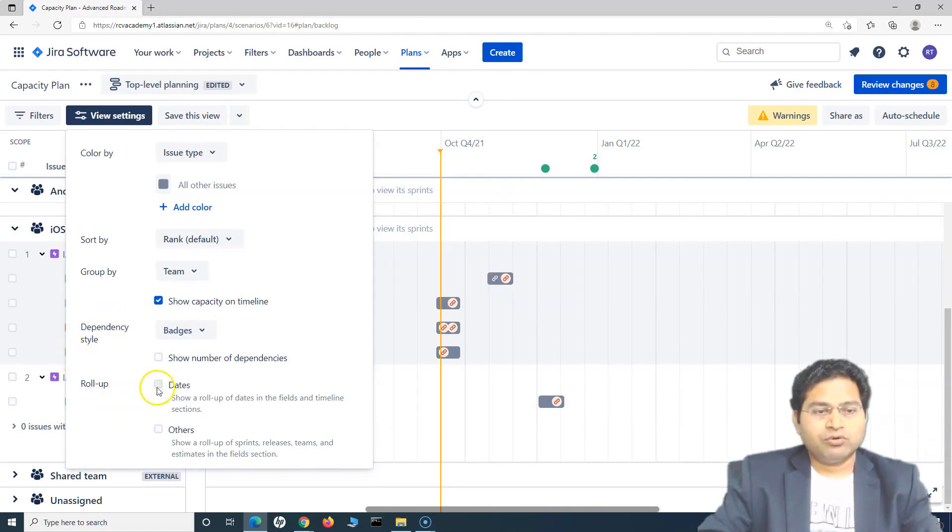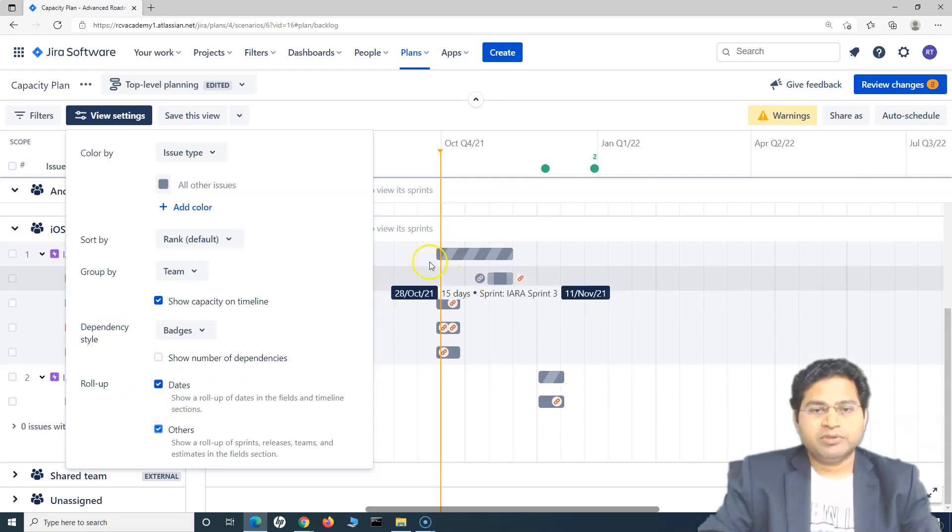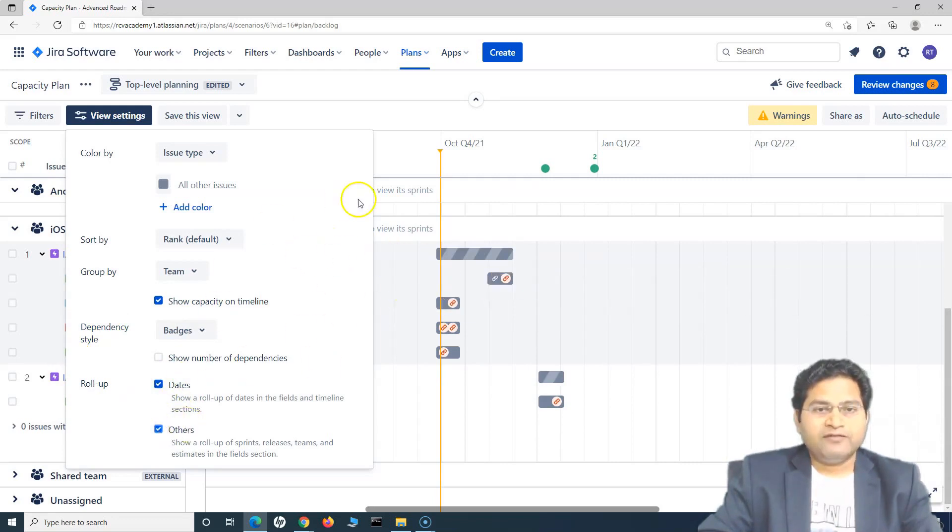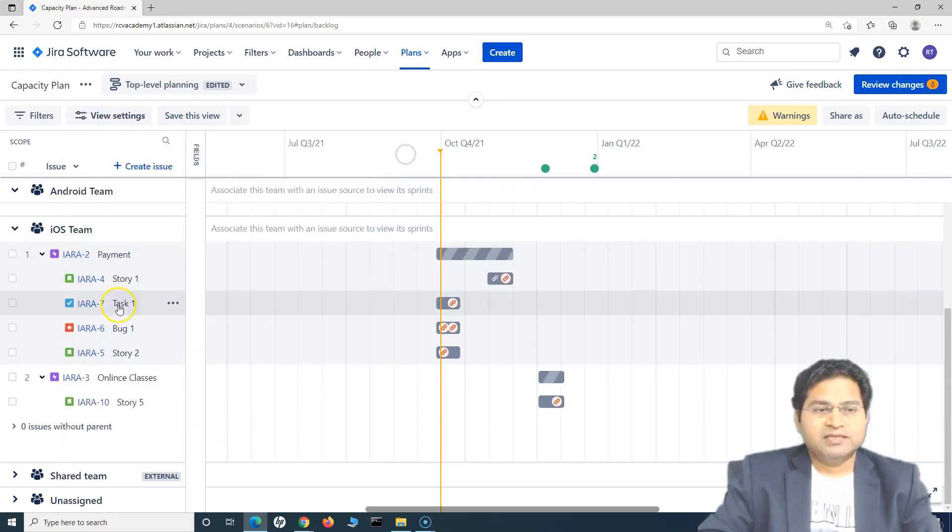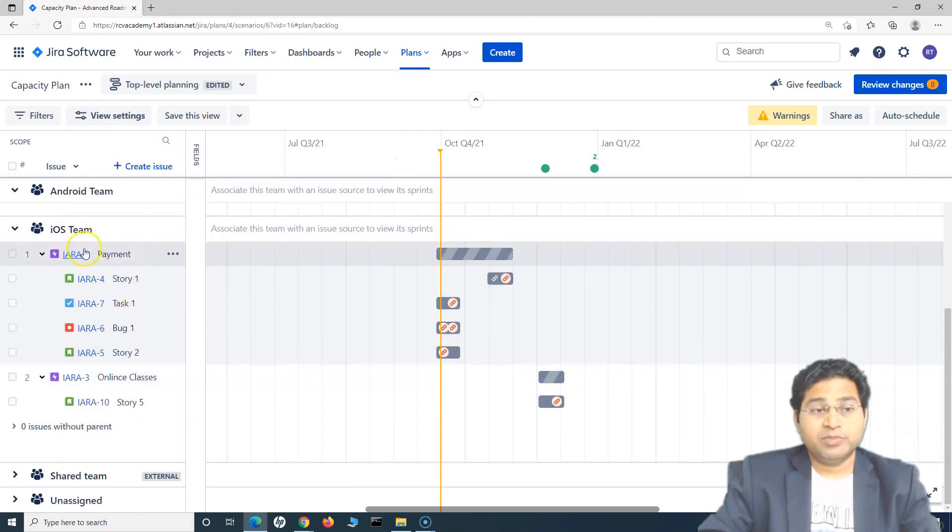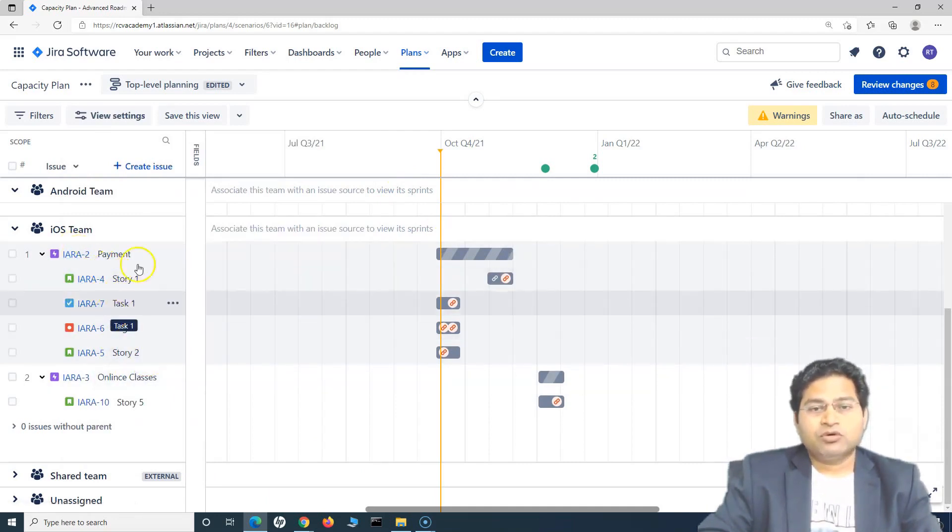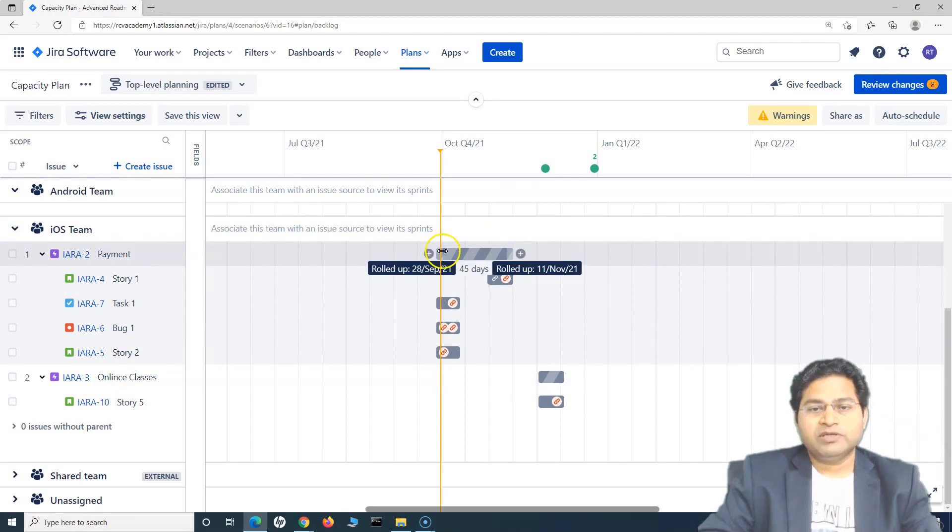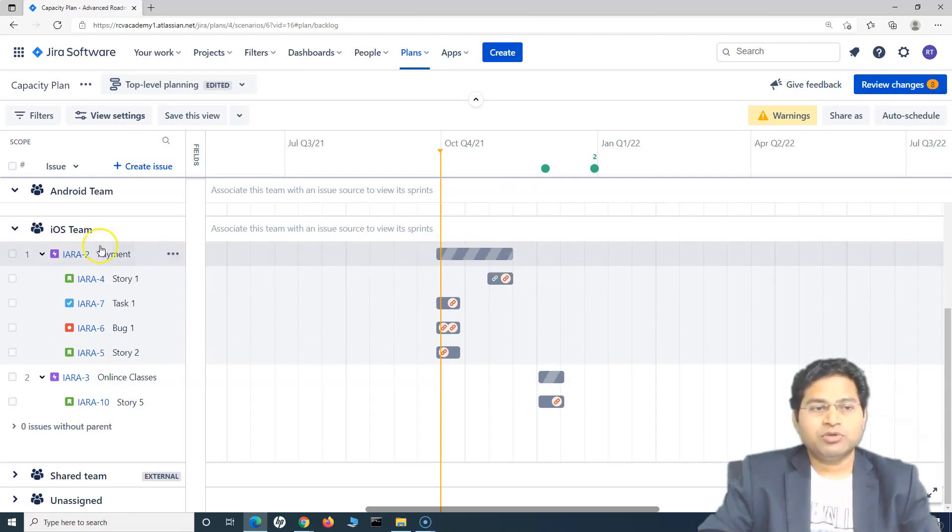Then you can roll up the dates and all other things. So say, for example, you have the dates defined in all of the subtasks or the issues that are below the epic, all of that will roll up and the rollup of the dates and everything will be rolled up to the parent item there.